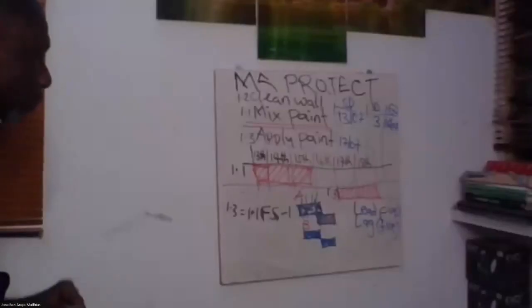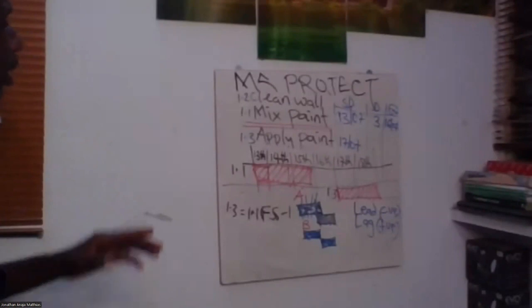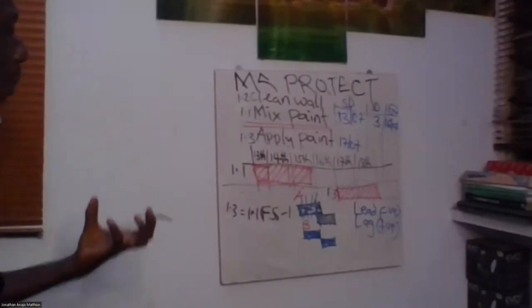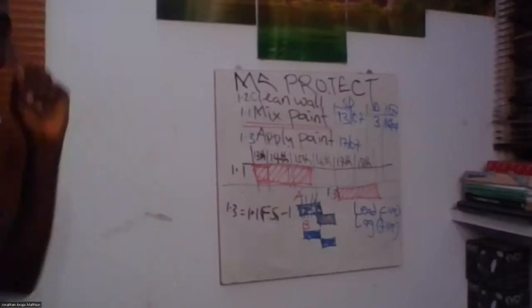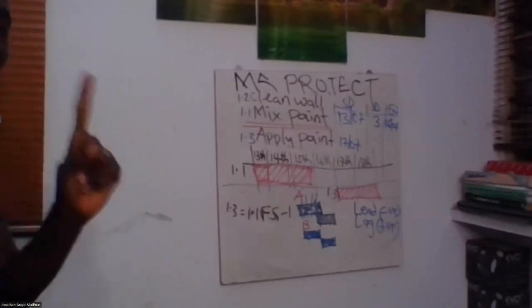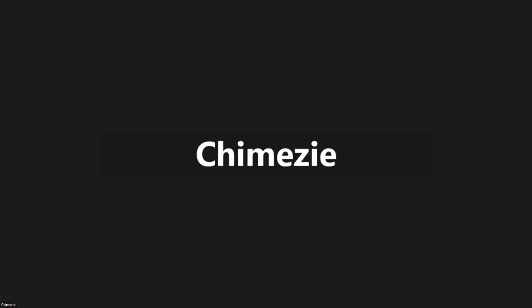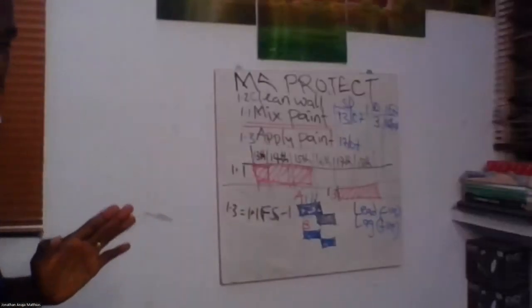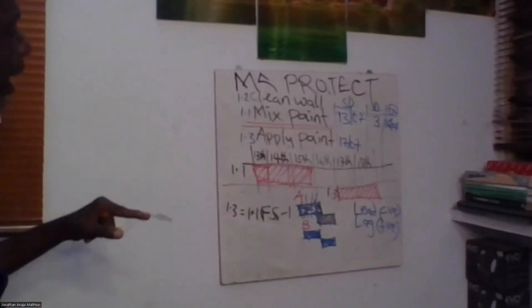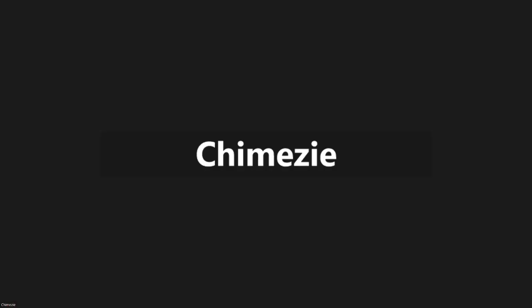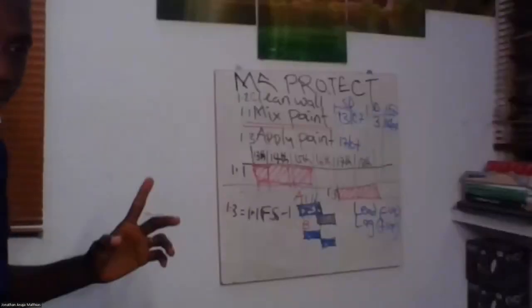Let me take that again. A is advancing the successor activity, which is application of paint, by 1 day. That is a finish to start relationship with a 1 day lead. Immediately you put this -1, it leads it by 1 day. Meanwhile, B is a finish to start relationship of mix and apply paint, but with 0 lead, right?